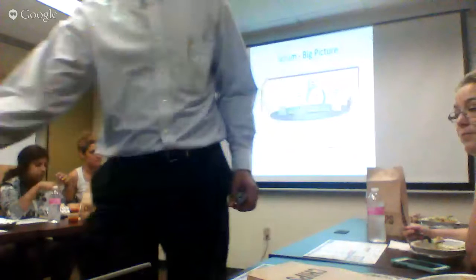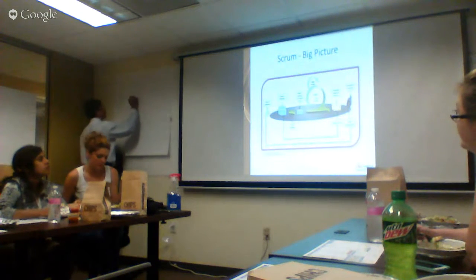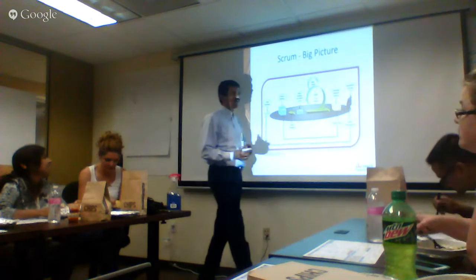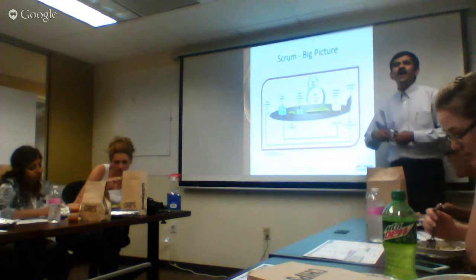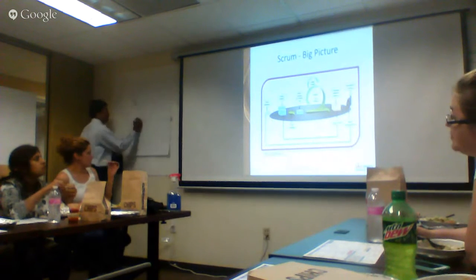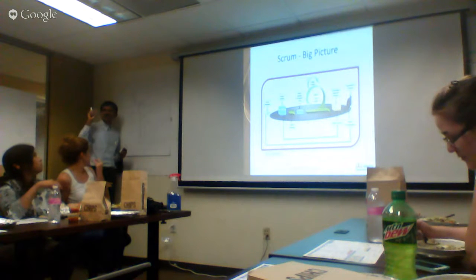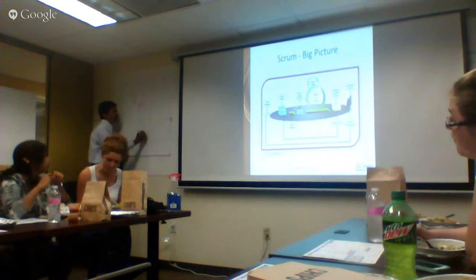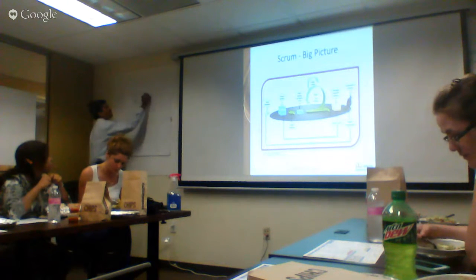Once you have an idea, what do you need after that? An RFP? Money? No. What is an RFP made up of? Requirements. You need the requirements. So you need a features list of the product you want to build, and that will be a long feature list. Some items you already know vividly in minute detail, while for others you have only a fuzzy idea. In Agile, we call this a product backlog.